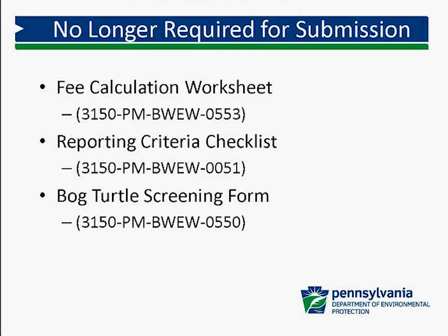Things that are no longer required for submission: the fee calculation worksheet to identify what your impacts are and the appropriate fees will no longer be required to be submitted with the registration packet. It will still be available on the DEP website and available for your use in helping you to determine the fees, and it will also be used by the review staff in determining whether the fees were adequate for submission.